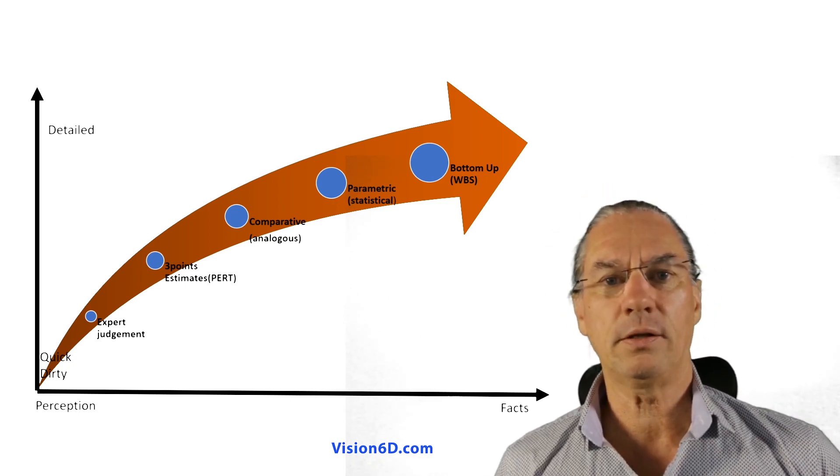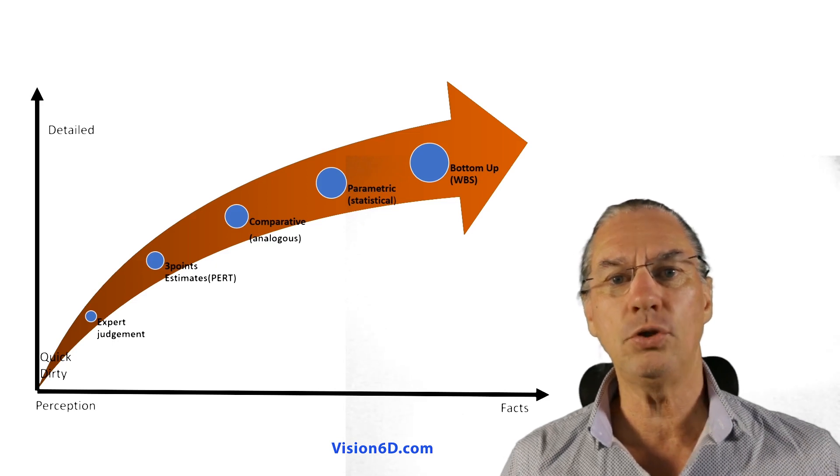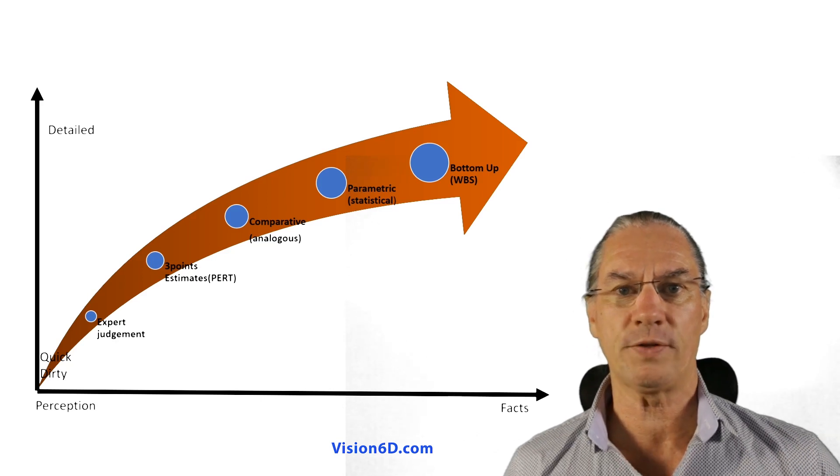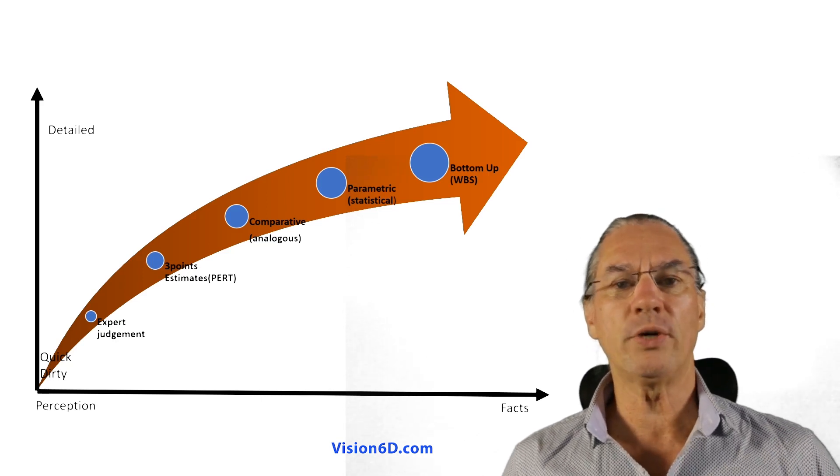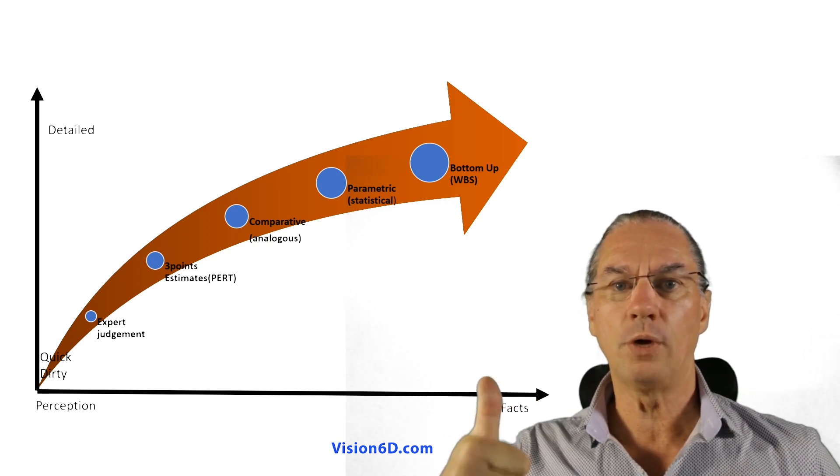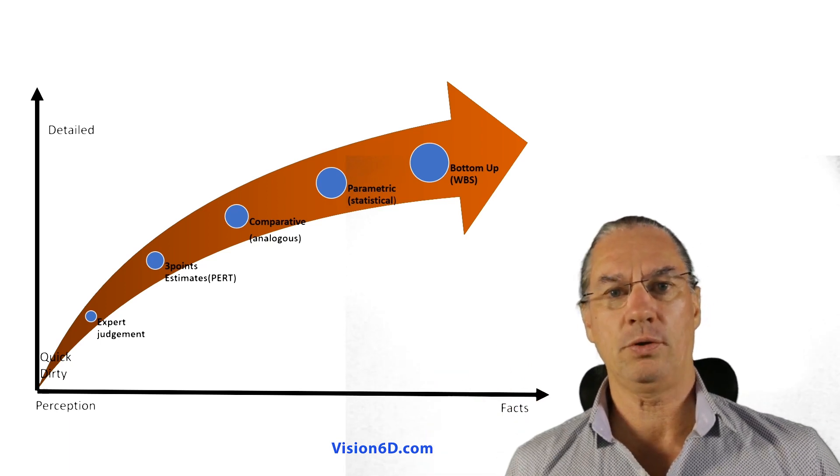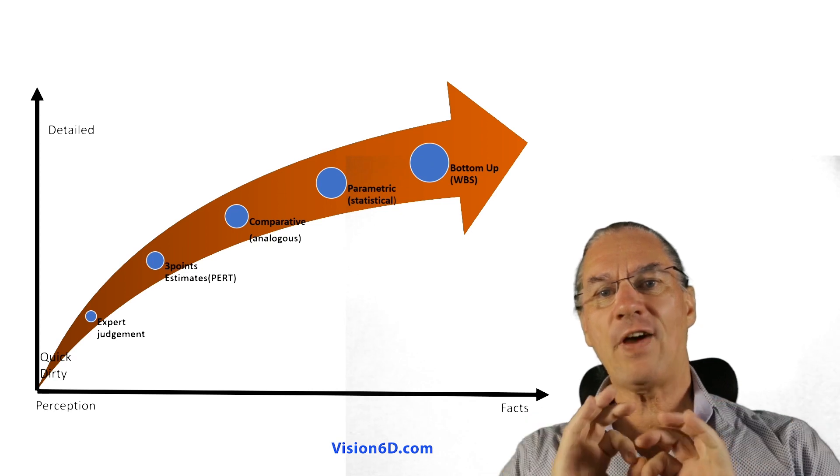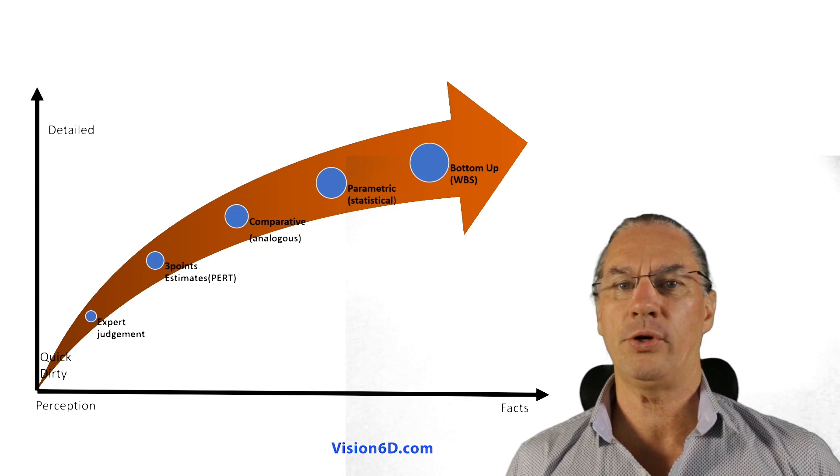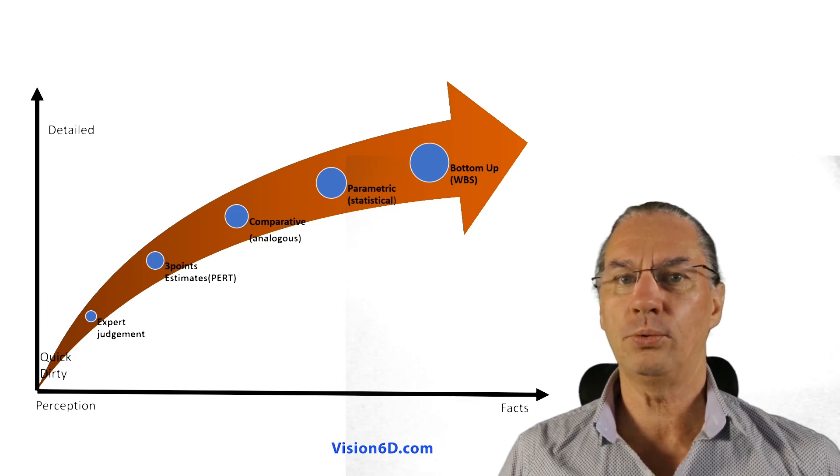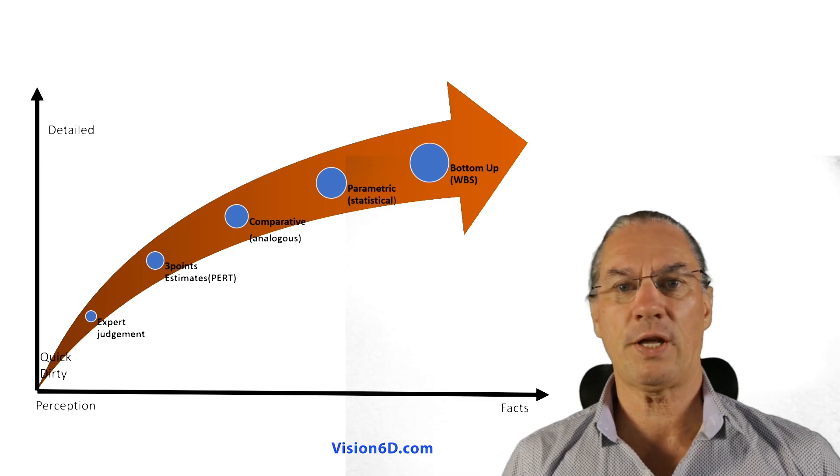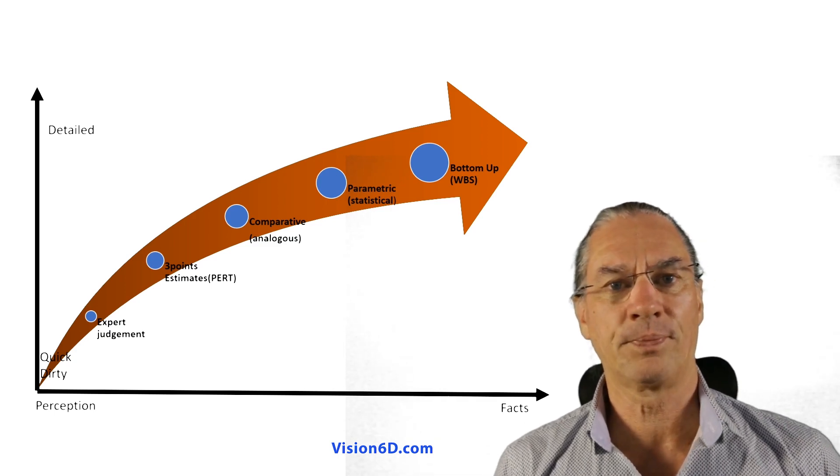The second method, which is the one that I see used by teams for software development or for many other projects, it's based on three different estimations. First, we do an optimist estimation. That is to say, if everything is going well into the project, how long is it going to last? For example, we can say, okay, it's going to last three months for the construction of the house.